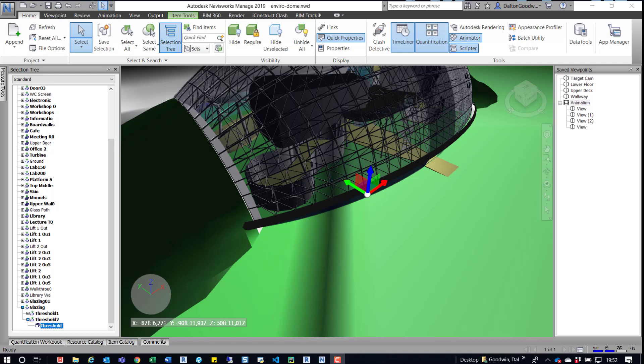In a 4D simulation, you simulate that building coming together on a timeline — each item being built at what time. From there, you can start to understand that process a little bit better. It's a better visual for folks that aren't used to P6, Primavera 6, and it's for planning a project so you can start to understand if you might have constructability issues — if you're planning one thing and haven't addressed another issue on the site that has to happen beforehand, you can identify those things through the 4D simulation.